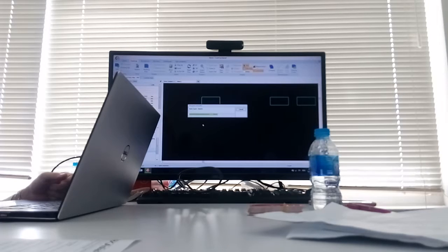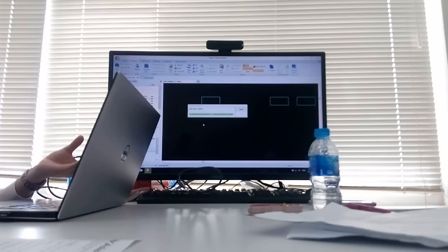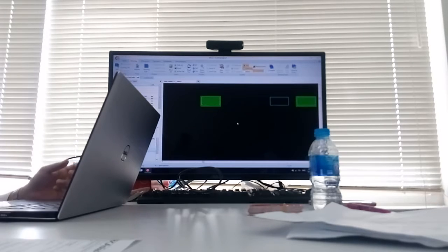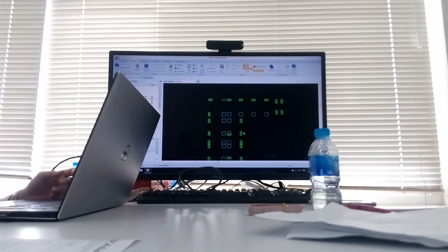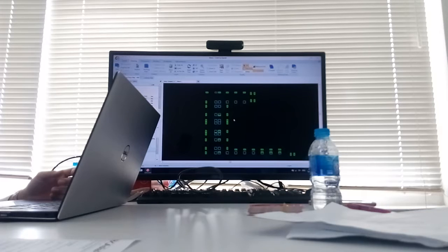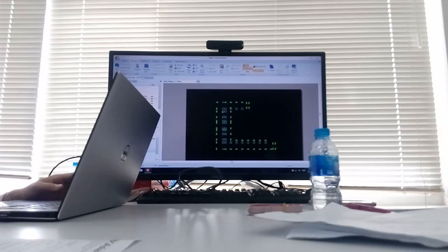This also depends very much on the drawing quality. If what you receive is a little bit different, then it cannot detect. You can see some of them are detected even though they are not file caps, so we can slowly adjust this. I should increase this higher. Notice that whatever I want is detected. All of the file caps are detected.